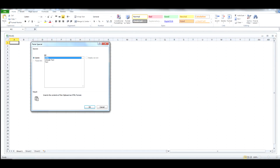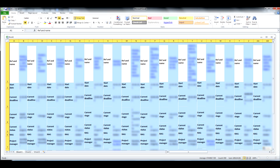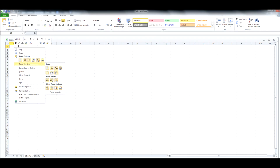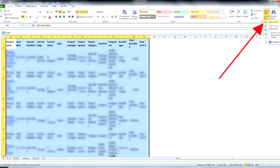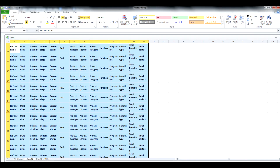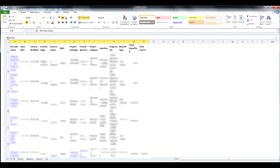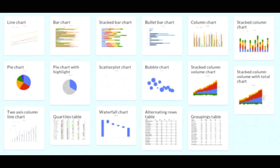The magic begins when you select everything and paste it to Excel. As special paste options are not available, just paste it. Now select all contents of the spreadsheet, go to another sheet, and use special paste to transpose your selection. Sort everything from A to Z, scroll down and remove the table labels still in the selection. When done, you have a neat Excel table with all data exported from Confluence in less than 2 minutes, and you can use the power of Excel to create whatever charts and diagrams your management requires.